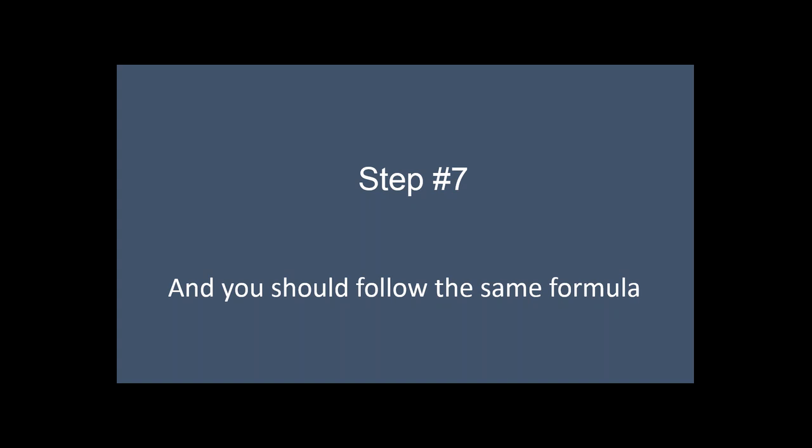So to avoid that, you should tell them, okay, for 5 pages, it will take me around 13 to 15 days, 12 to 15 days. Now, if you are saying that I will deliver it in 12 days, and if you will deliver it in 7-8 days, that's a great thing. Your customer is happy. But if you are giving them a deadline of a week and delivering it in 15 days, then it's a bad sign.